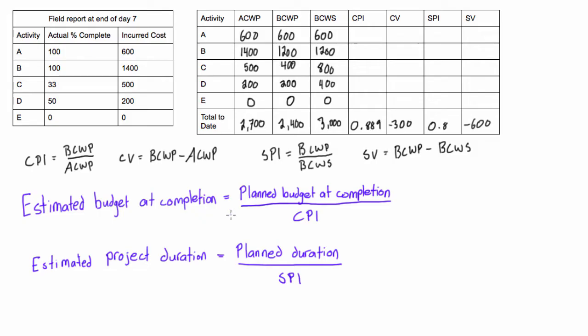So we have our estimated budget at completion, which is just the planned budget at completion over the CPI. It's really simple stuff. We also have estimated project duration equals planned duration over the SPI.